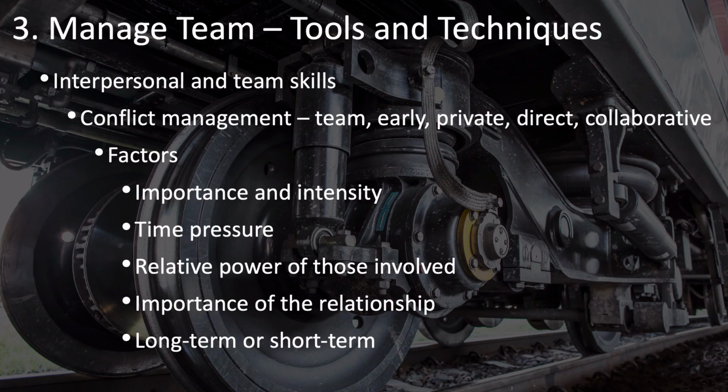But you have a team charter in place that has some guidelines for some of this conflict resolution, and it shouldn't start with the project manager, believe it or not. It should actually start with the individual team members, because they should take some responsibility for managing conflict. They can use the team charter as a guideline, but the first step is for them to see if they can work out their issues. If they can't, then you as a project manager need to get involved, and you should get involved early on if they can't resolve it.